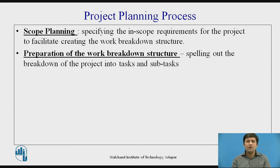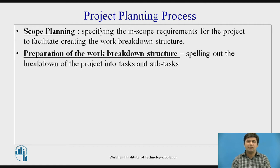Preparation of the work breakdown structure involves spelling out the breakdown of the project into tasks and subtasks. For example, if we need to build a road of six kilometers, we break it down into the first kilometer, second kilometer, and so on. Within the first kilometer, we further break it down into 100-meter sections, then the second hundred meters, and so on. Each section must be clearly defined and assigned to someone. Preparation of the work breakdown structure is far, far important in the project planning process.